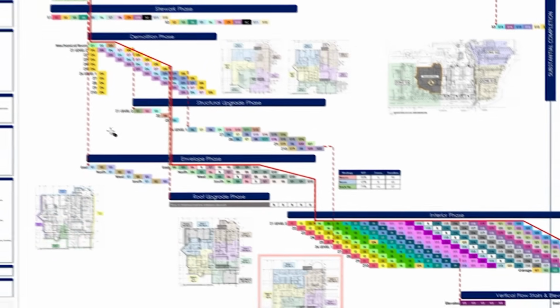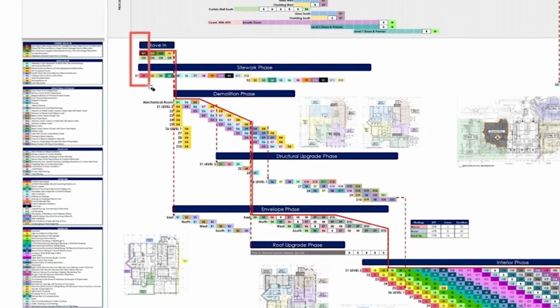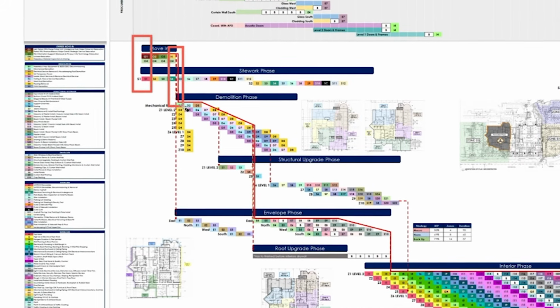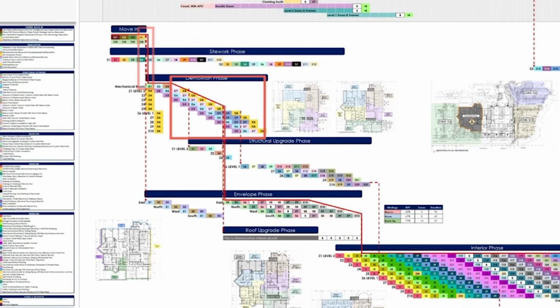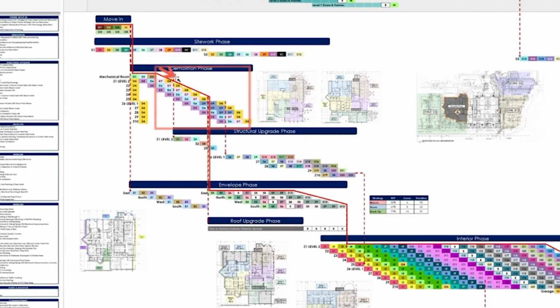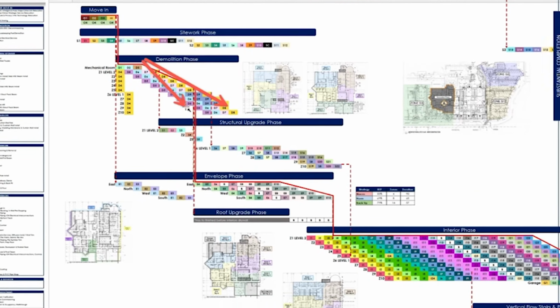And again, you have a couple of different options. I usually analyze start dates. I analyze transitions. I analyze the line of balance. Is this going fast enough? Actually, let me do that with the arrow. Is this the right line of balance? Can I go faster, right?